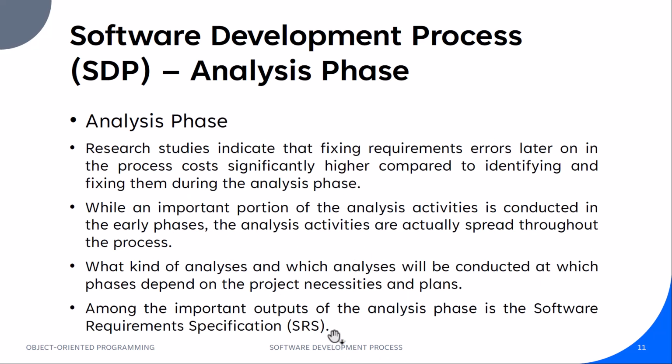Now, research studies indicate that fixing requirements errors later on in the process costs significantly more compared to identifying and fixing them during the analysis phase. That's why we want to identify potential errors or potential mistakes during these phases, and especially requirements errors.